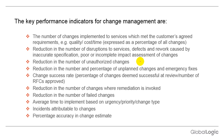Reduction in the number of unauthorized changes — we must reduce unauthorized changes. Reduction in the number and percentage of unplanned changes and emergency fixes. While emergencies are not always in our hands and can come at any time, with proper maintenance of services and systems we can avoid emergency breakdowns. The main KPI is to reduce the percentage of unplanned changes and emergency fixes.